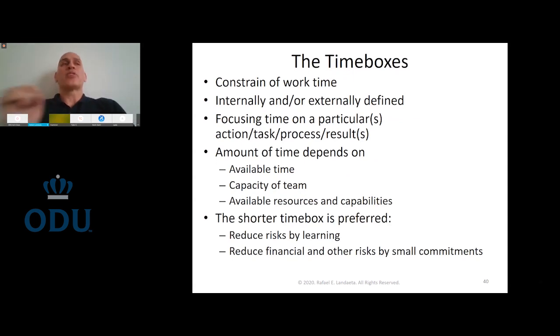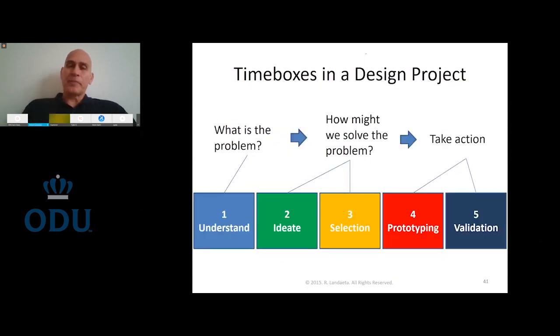And the most important thing about time boxes is that we always prefer the shorter one. Why? Because if you fail in that time box, you only committed a small amount of time and a small amount of resources. But you achieve something really important, which is learning what doesn't work, so that you can apply it in your next iteration, your next time box. So we work in small commitments, and as I said, if we fail, we fail in a controlled way.